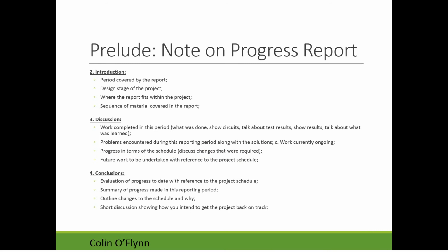So you could have a breakdown. Here's the work breakdown structure. Here's a list of tasks, subtasks, anything that communicates, here's what we have to do. Here's the time we're estimating for each one. Here's who is going to do each task or subtask. And the schedule will also include the future work that you're going to be undertaking. So, I'm going to do this, my partner's going to do this, or whoever's doing this and this, when we're hoping to have different areas done. So that's sort of the future work.